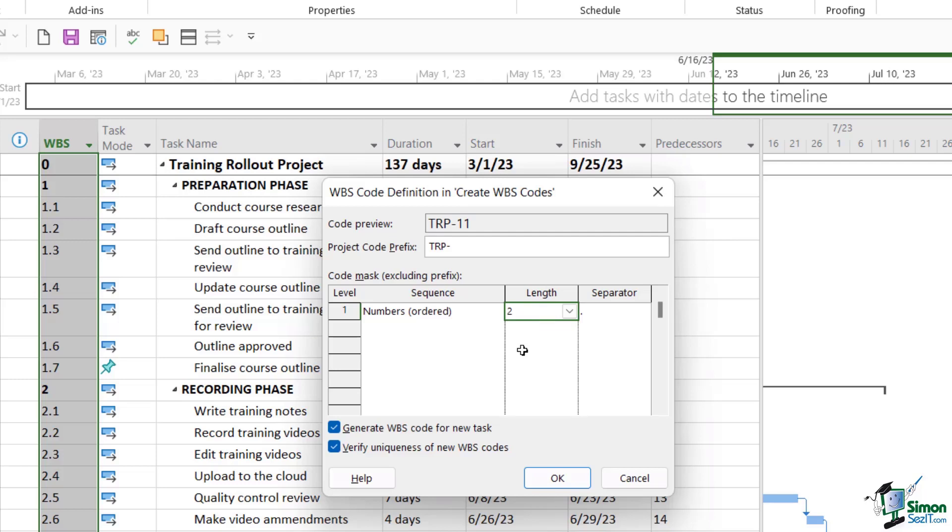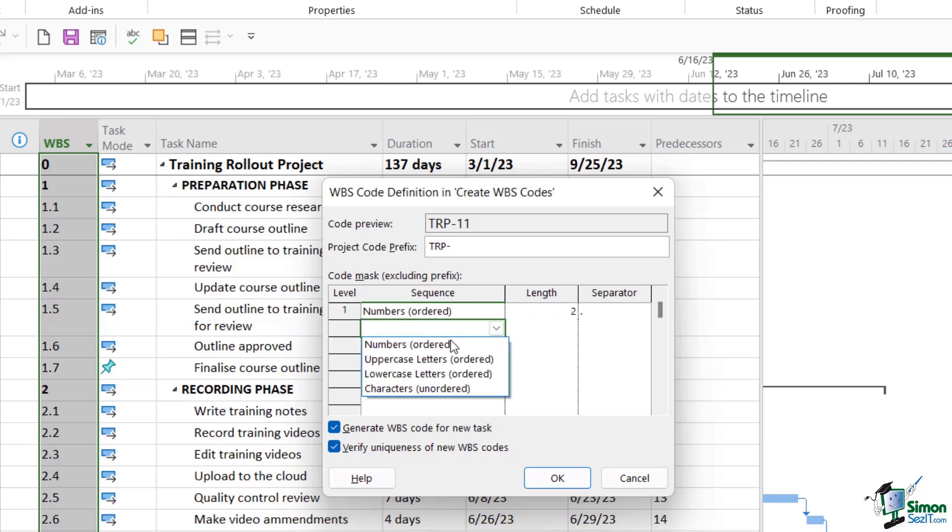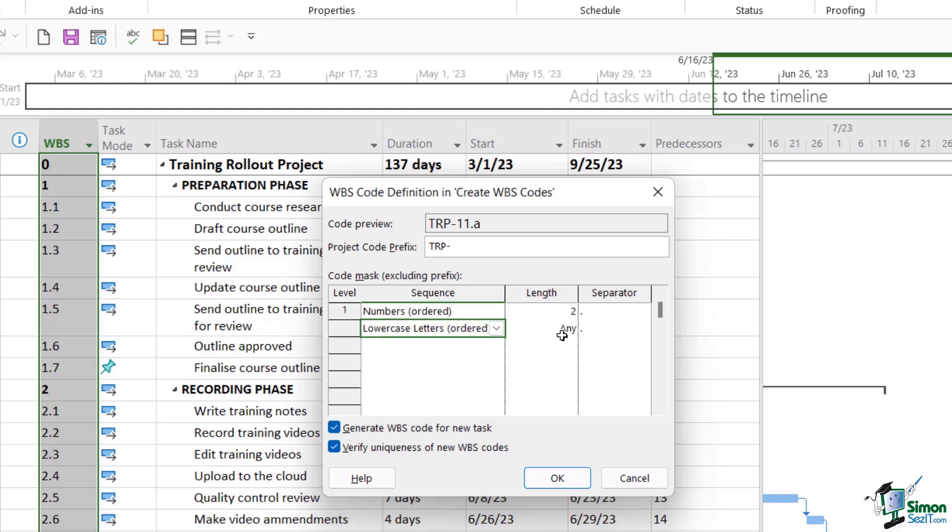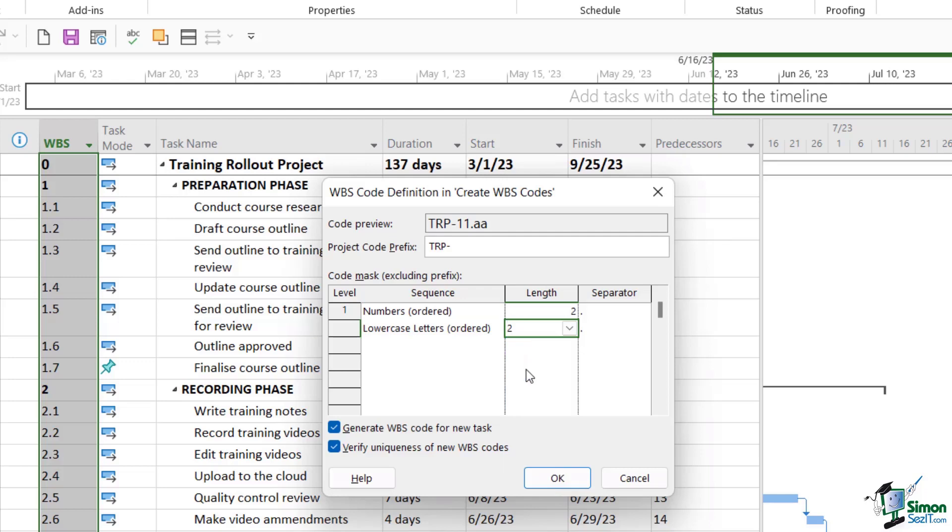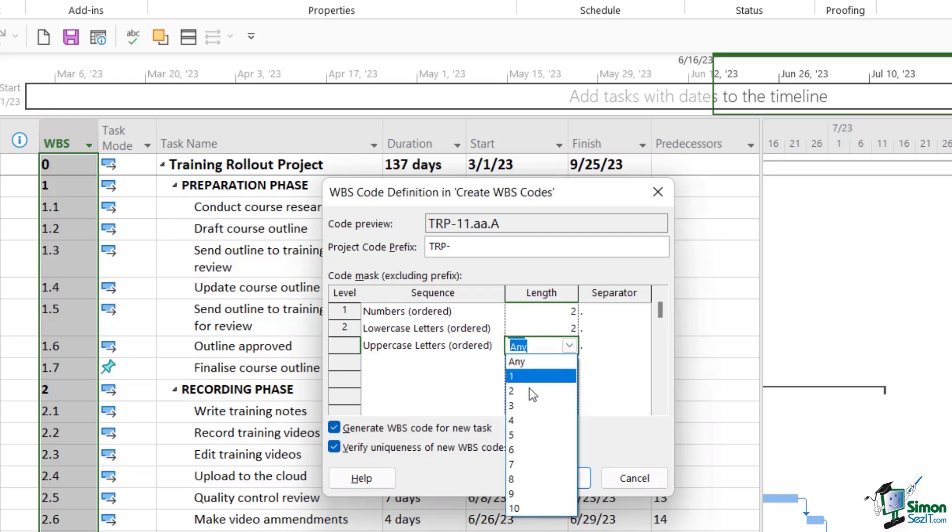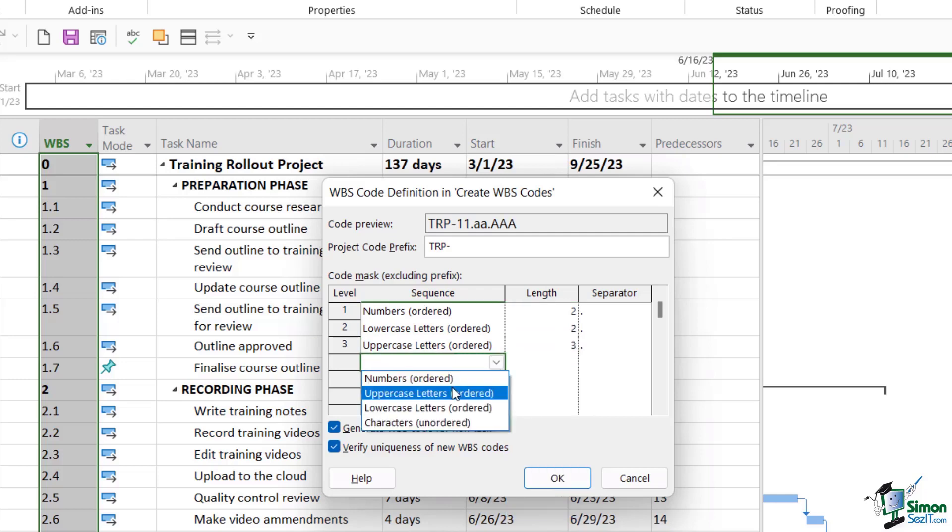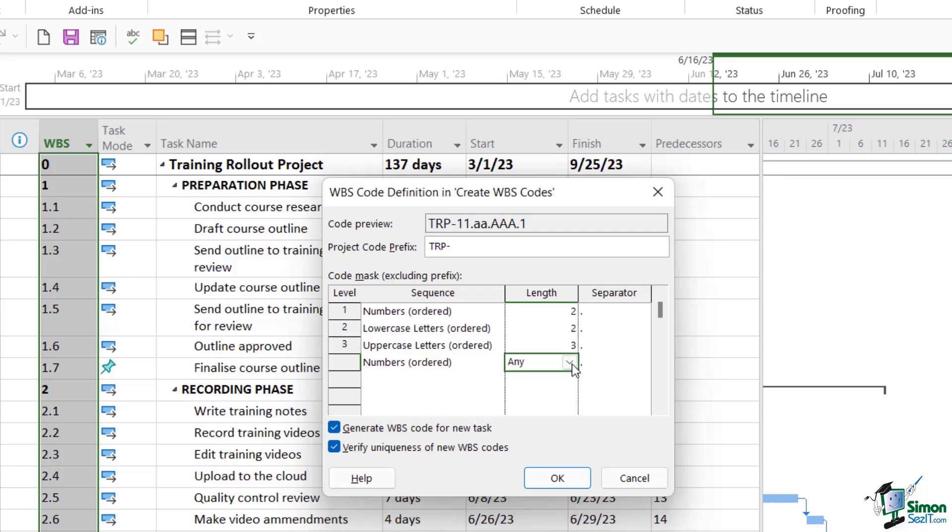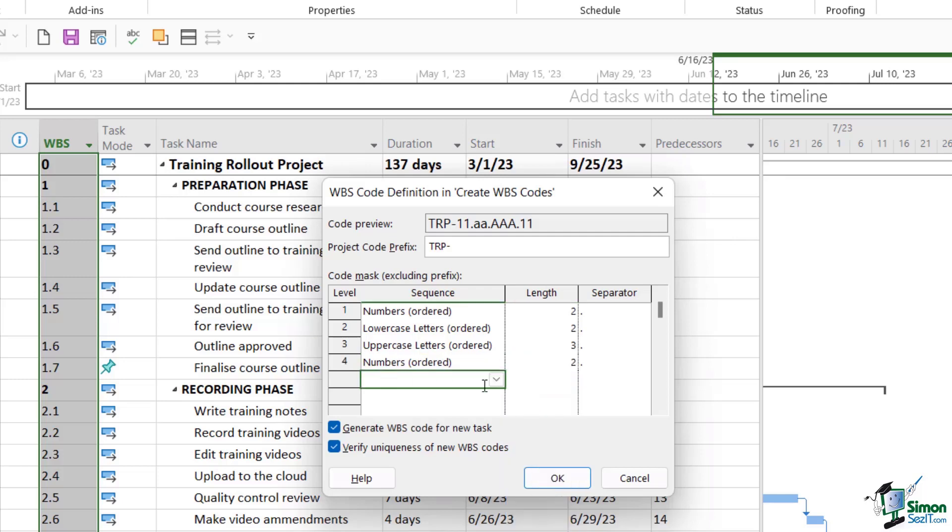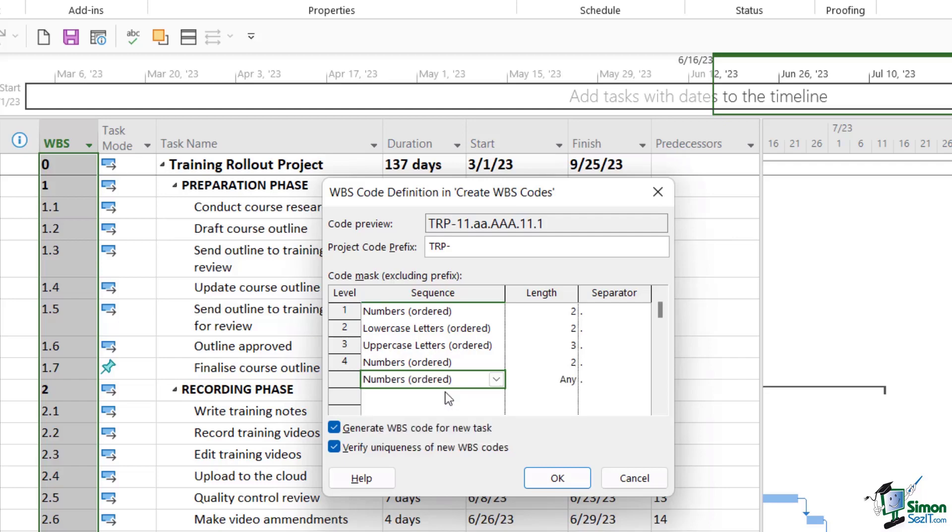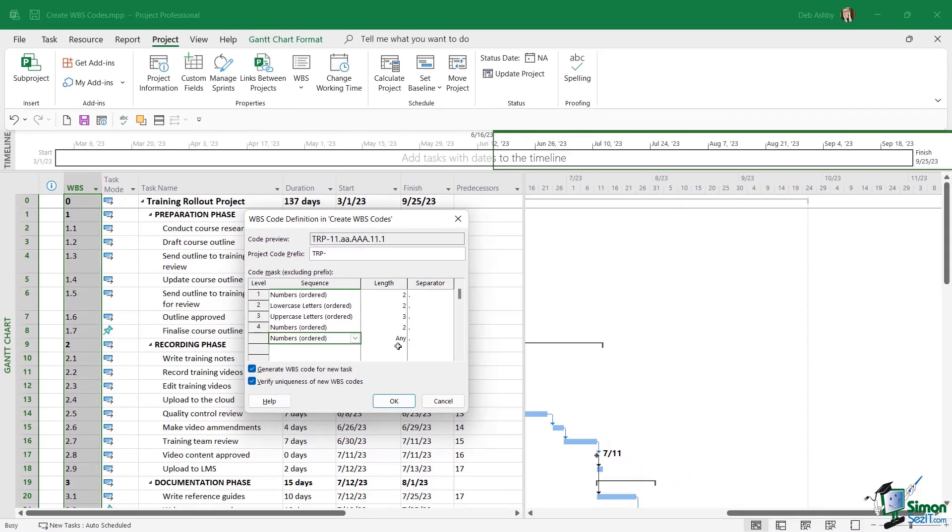Now I'm going to add another level and this time I'm going to choose lowercase letters, and once again I'm going to select two characters. And again you can see in the code preview exactly what this is going to look like. So this part of the code is going to run through from a to zz. Let's add another level, so I'm going to say uppercase this time. I'm going to make the length three. Our fourth level is going to be numbers and I'm going to set this to two. And let's add a fifth level as well that's also going to be numbers, and I'm going to leave that on any length. So now we've defined what our code is going to look like.